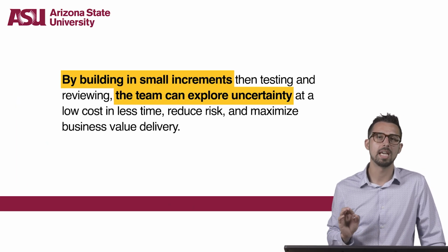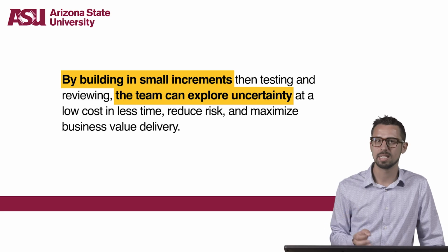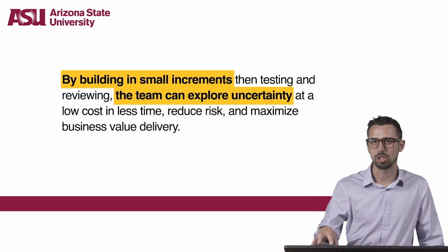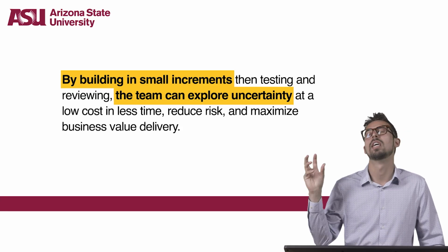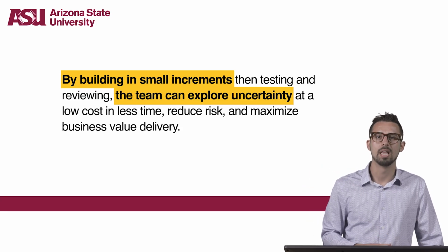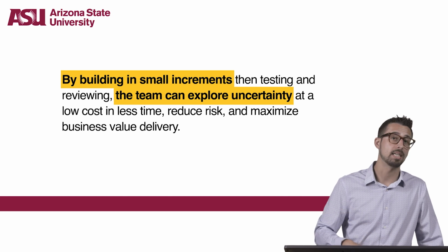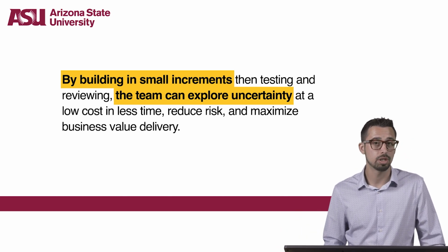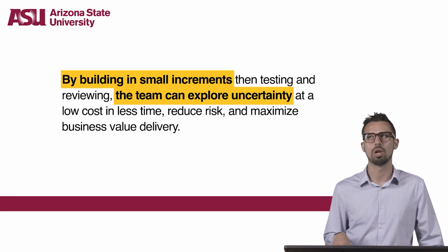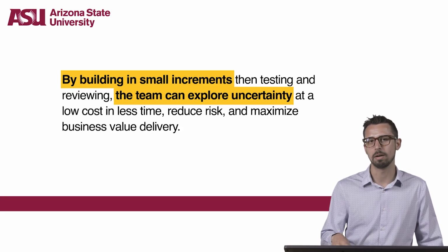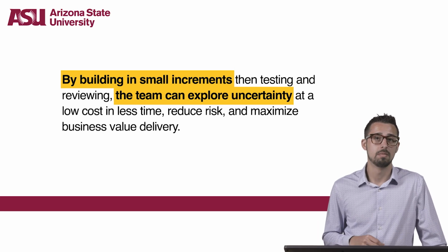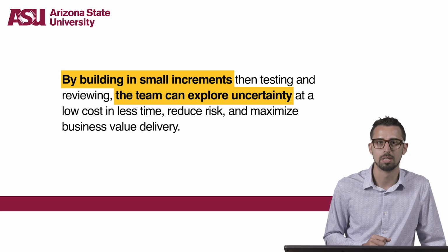By building a small increment and then testing and reviewing it, the team can explore uncertainty at a low cost in a very short amount of time. They can reduce risk and maximize business value delivery. This uncertainty may be centered on suitability and requirements, and a good question to ask is, is the right product being built?